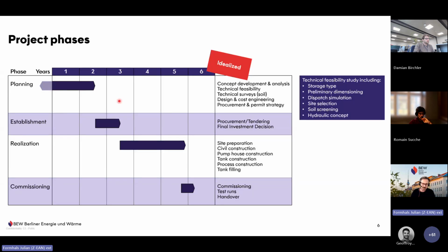In this case, it was quite obvious because we had to build something here at the Reuter site to replace the coal generation capacities, and the storage is part of the overall package here. So the site selection was quite easy. We did a lot of different simulation studies where we compared different technologies and different dimensionings of the storage, and narrowed down the opportunities a little bit.